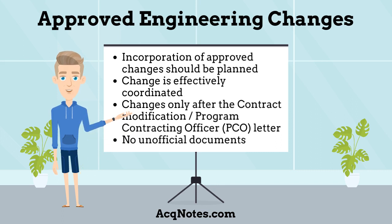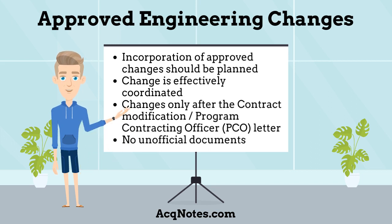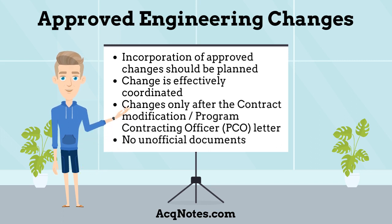Changes shall be incorporated only after the contract modification or program contracting officer letter or implementing directive is published. Unofficial technical documents shall not be used as authority to incorporate changes.